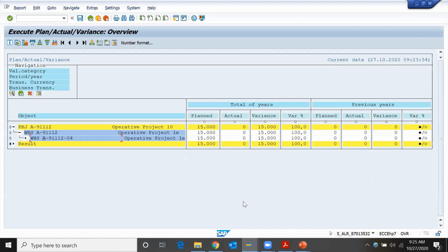So if I create an actual PO, then do I need to do goods received? Yeah, good receipt. Whenever we do good receipt, then actual cost will be posted. Actual cost is nothing but cost of goods issue, deliveries, service entry sheet, good receipt, goods issue. That's it.